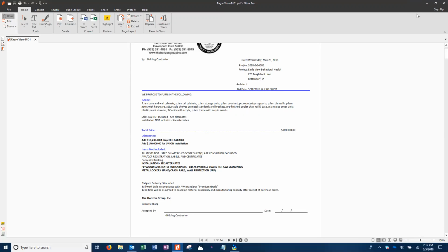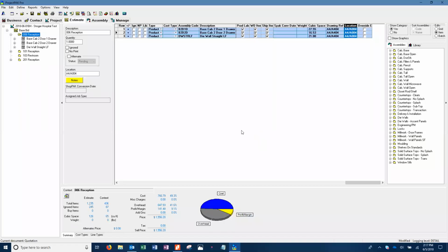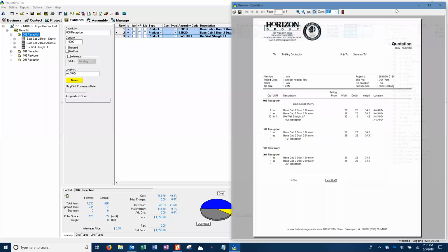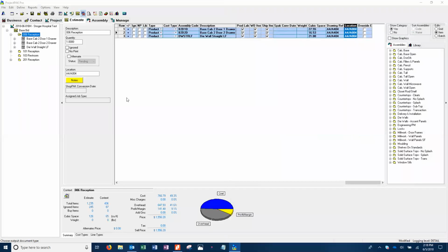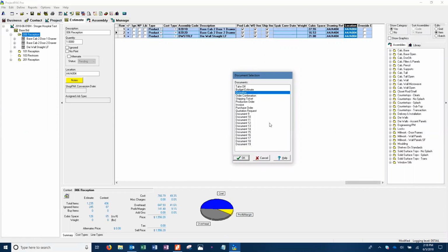Yeah. And I know for me, my big one was the fact that I quoted everything with Wilson Art, so if you didn't spec out Pionite or Nevamar, I was quoting it with Wilson Art, and if you came back to me after the job was awarded, it clearly stated in my exclusions that that's the way I build it. So when we think about those headers and footers as exclusions and scope, if you just go up to that blue and red again. Oops, wrong one. Yeah, the note I put on about if you do not see it in the scope, then it's not included, because people would call up and say, well, you didn't exclude it. Well, I didn't include it either.